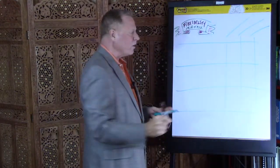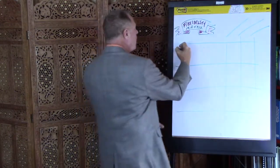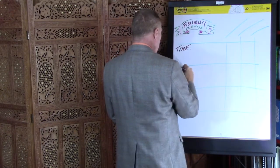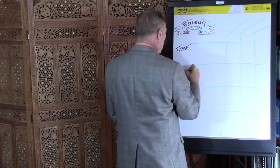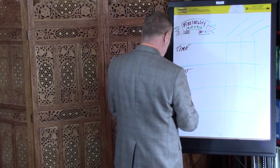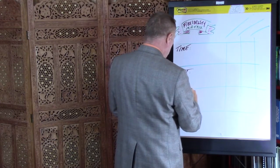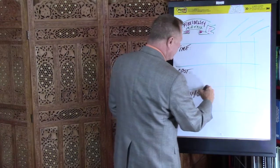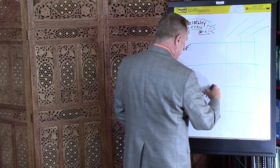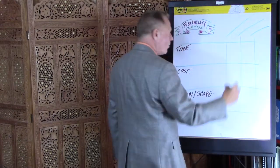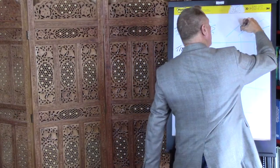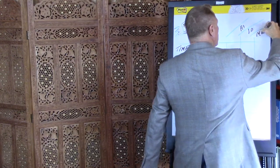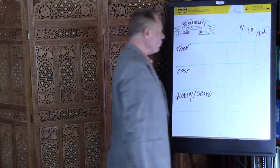A flexibility matrix always includes time, cost, and quality. Quality is sometimes viewed as scope. We know by default one has to be high, one low, and the third one will be moderate.